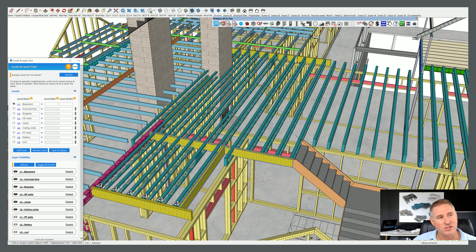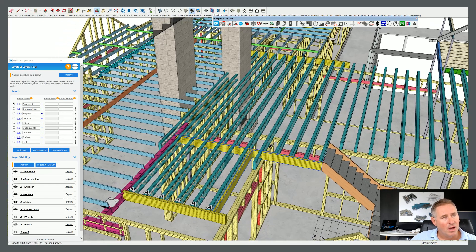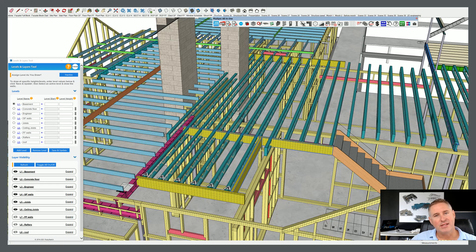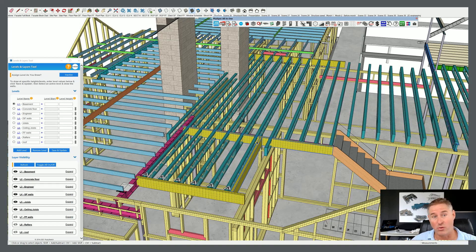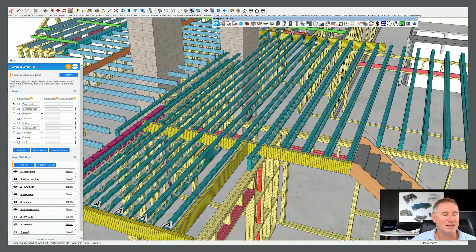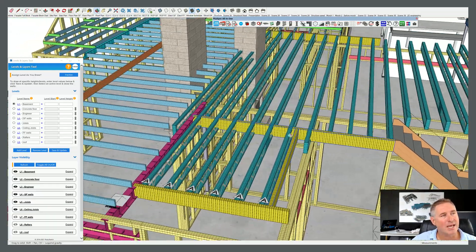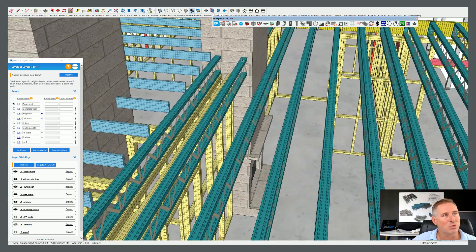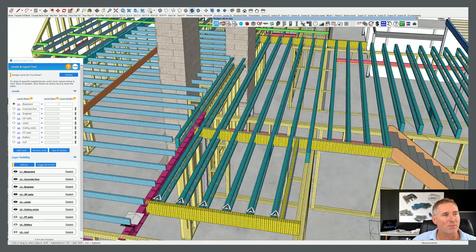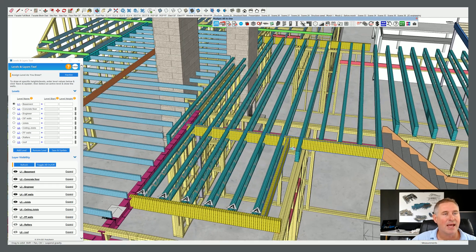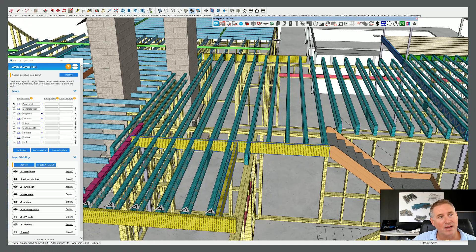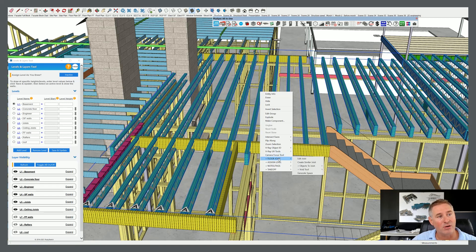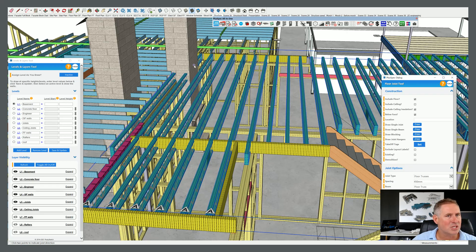Confidence is what we're going for in this particular project. There's some brilliant 3D builders out there that will do this stick by stick, and it's reasonably expensive. When there's a change like this it's even more expensive, but it's cheaper to solve things virtually before coming across this on site because these joists have been engineered for spans. What do I do? There's a couple of things. The fireplace has moved so I've got a joist running through the middle of my fireplace, and I also have two new beams in here. I'm going to show you how I would deal with this.